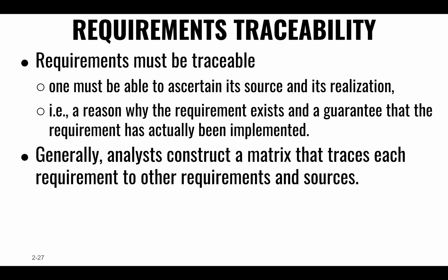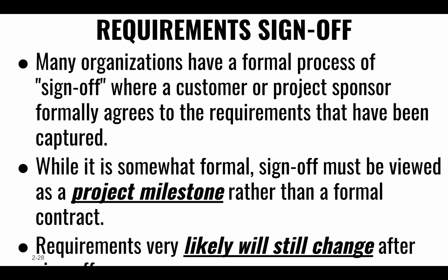So presumably there's traceability: I'm writing this because of this functional requirement that came from this user requirement that came from this business requirement. You can go back to whoever's paying for this and say, yes, I'm working on that business requirement. This line of code is because of that.